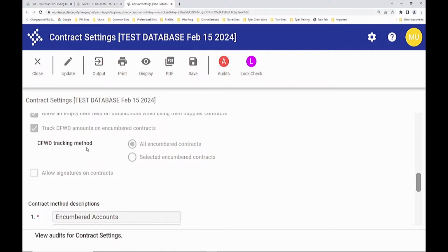When I worked for HDR Engineering, we were the consulting engineers. So we would oversee the project and the contractor that was building it for our client. Every week, we would get a payment sheet of what they paid their subcontractors for that week, and we had to keep that on file.